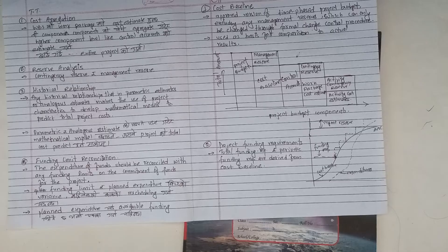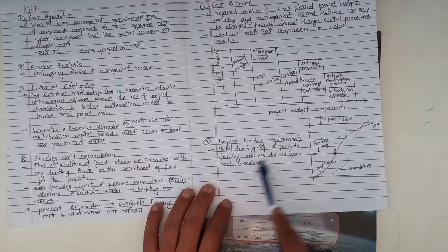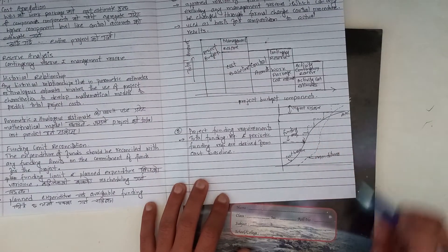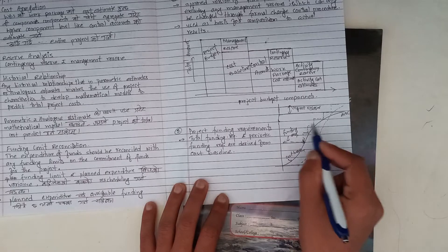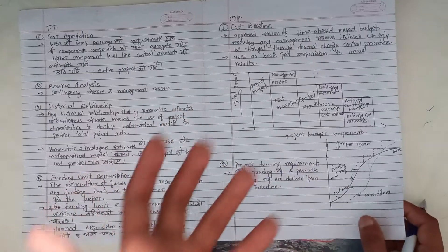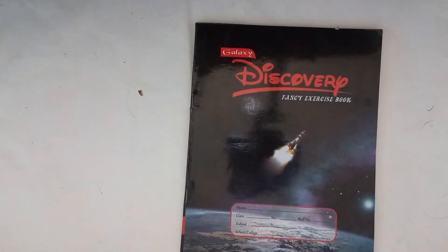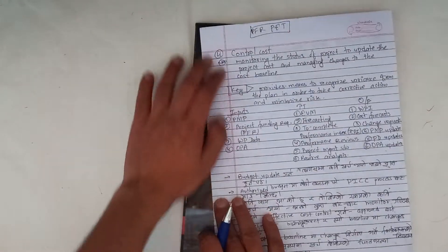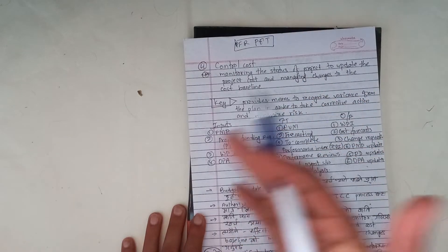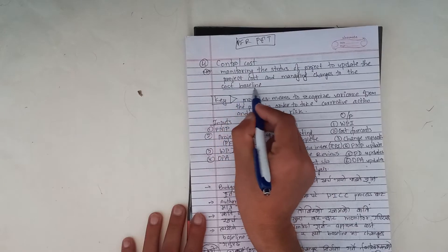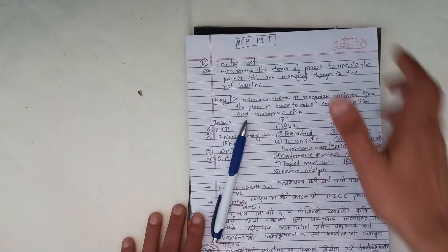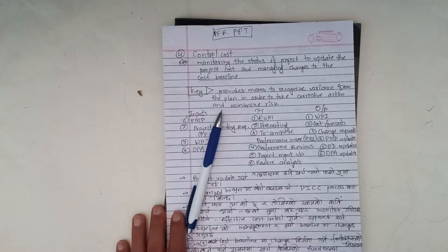Cost baseline plus management reserve equals the overall project budget. Total funding requirements or periodic funding requirements are derived from the cost baseline. Suppose we have a cost baseline — the expenditure diagram shows a ladder type. If you have any funding limits on the commitment of funds for the project, then there is a planned expenditure variance and you may need to reschedule work.